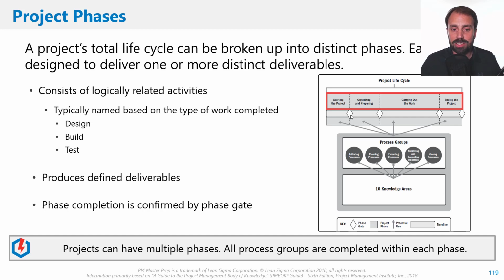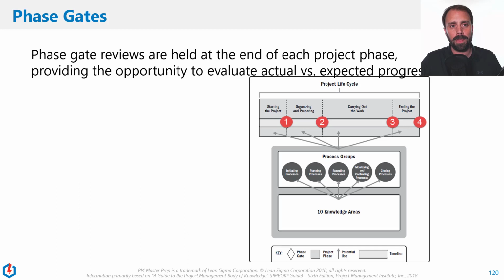And we're going to have a decision. We're going to have a conversation about what happens. And that's a phase gate. That's a go or no go situation where we evaluate our progress at this point and decide, do we want to leap into the next phase? So that's what that means. Each phase is confirmed by a phase gate where we're evaluating the completion of the previous phase and we're deciding whether we go forth. All right, so let's talk about these phase gates.